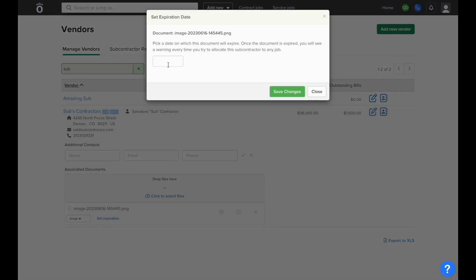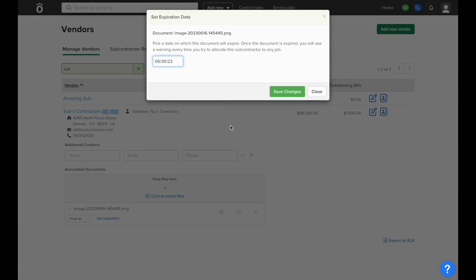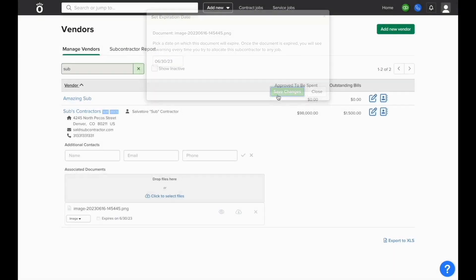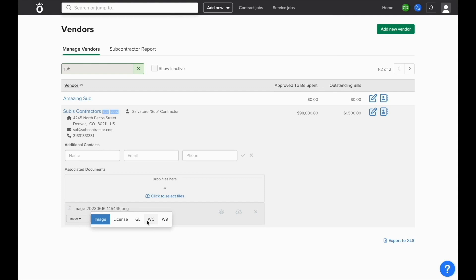Setting an expiration will also help when you're running reports on subcontractors or if you're going to enter a subcontract to make sure that all of their documents are up to date. You can classify this document as an image, a license, general liability, workman's comp, or a W9.